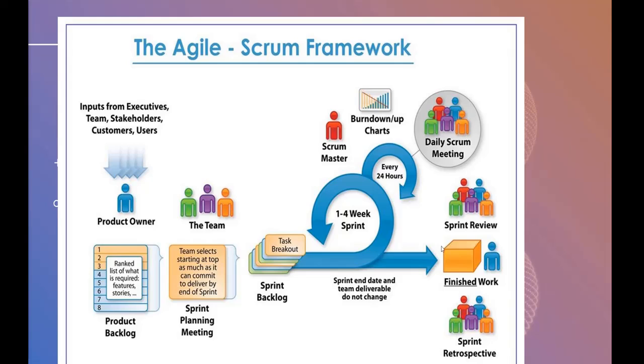That means they have developed the product. Now the stakeholders come, the Scrum Master comes, and the developers also come here, and they start the review of their deliverable. They inspect whether there is any issue, they collect feedback from the product owner, and they find out any faults. It's like inspection and then adaptation. So if there is an issue, they will adapt. Also, they collect the feedback from the product owner.